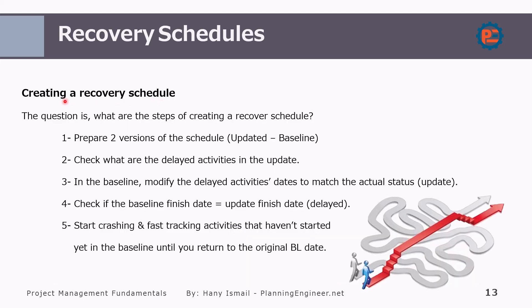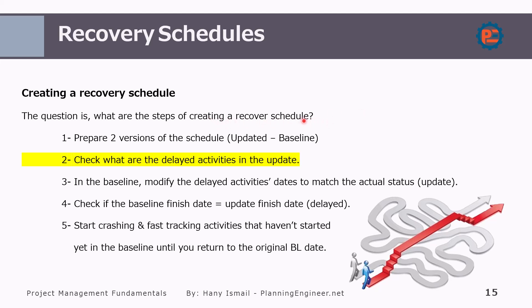When creating a recovery schedule, the first step is to prepare two versions of the schedule — one updated and one is a baseline. Then we check what the delayed activities are in the updated schedule. One important note: I see many planners who consider the updated version of the baseline schedule and treat it as a recovery schedule with actuals. This will cause issues later in forecasting percentages and dates.